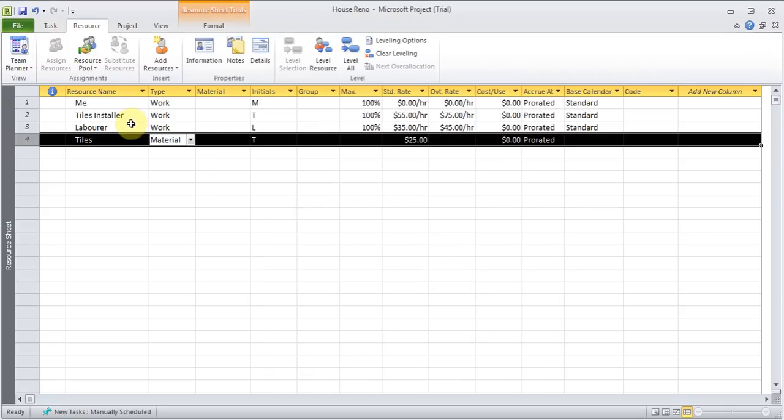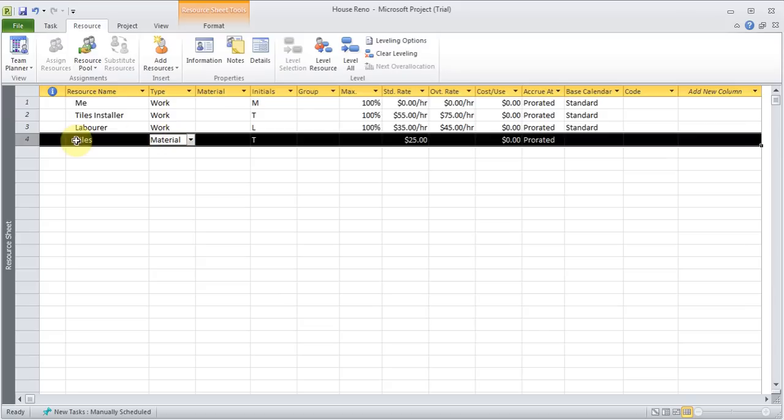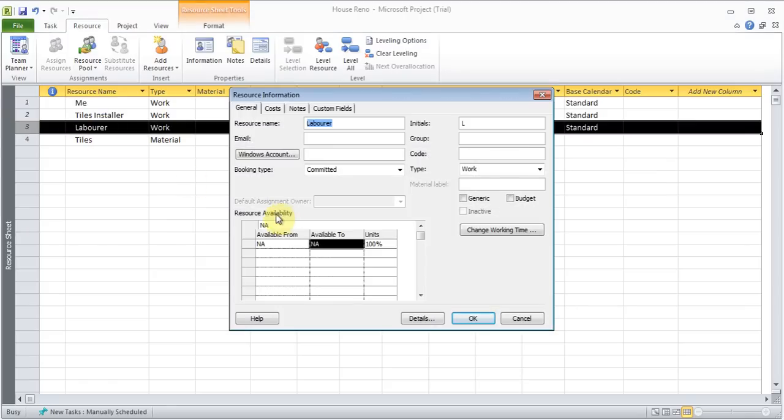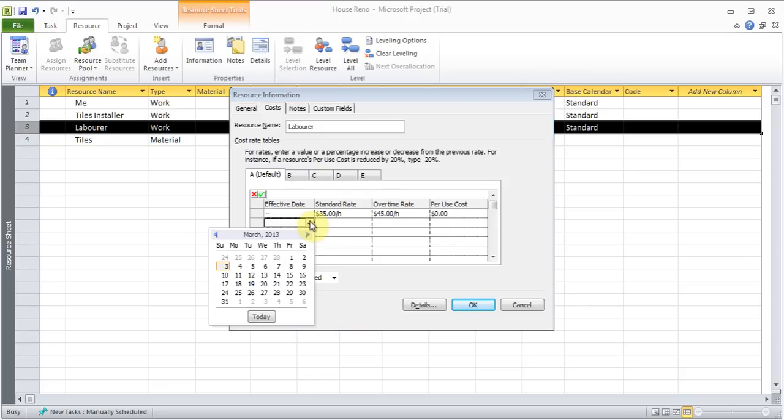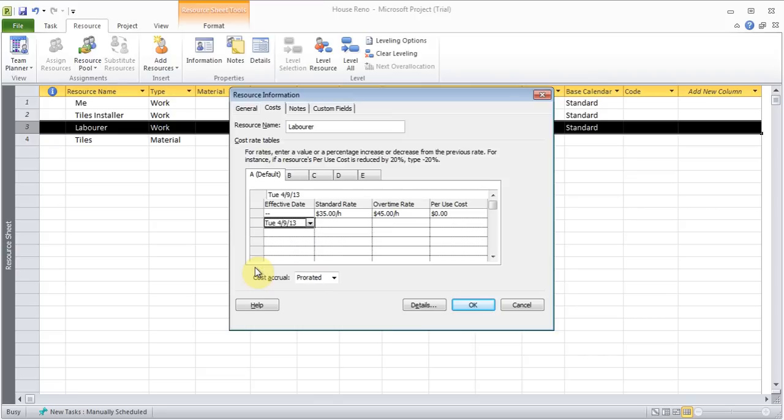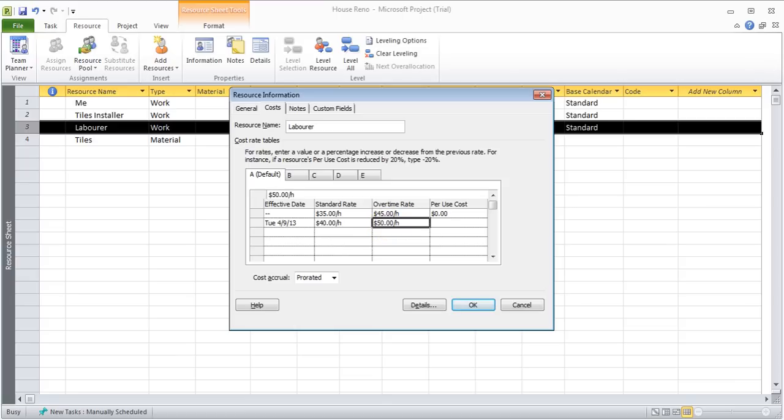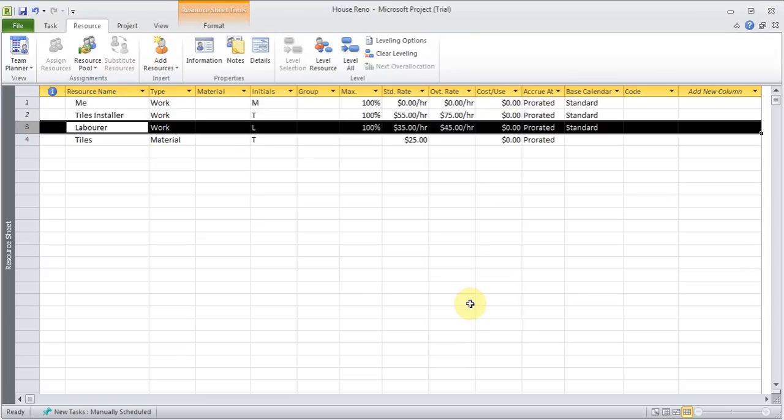The next thing I want to talk about is about the rate change. So for example. The laborer. Was $35 an hour. And something happened during the project. Where his rate is changing. So I can double click on it. And I can add an exception. So in the cost. I can click here. And I can say. You know what. This guy. Maybe. Around 9th of April. His rates are going to $40. And overtime will be $50. Click OK.